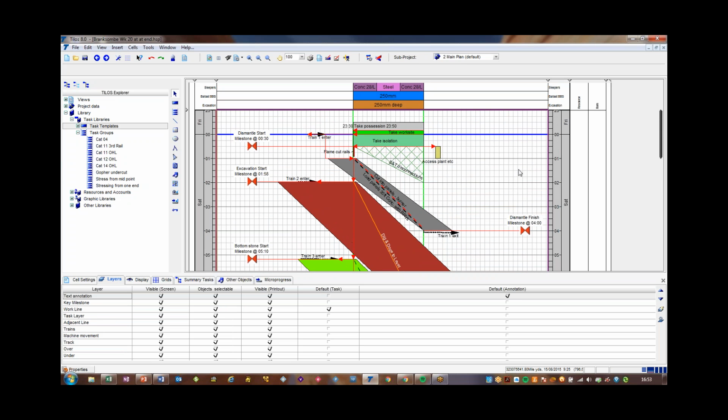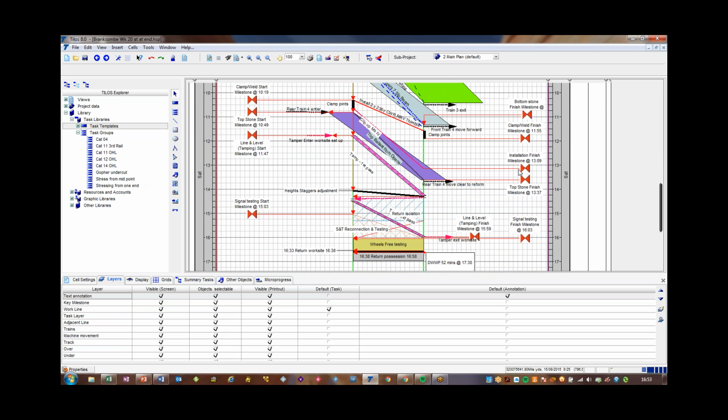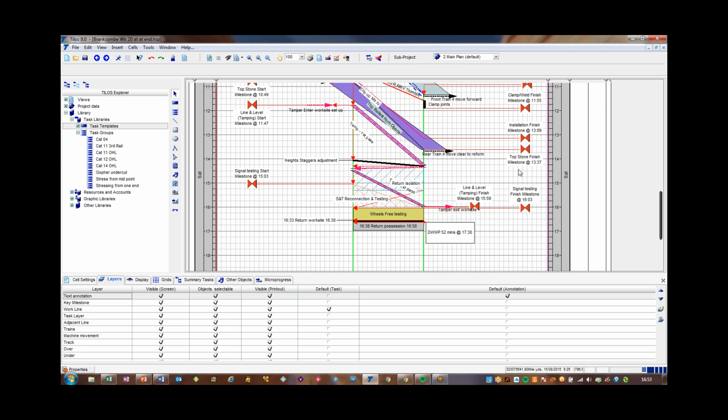That is it. So that's what I try and train people to do. In 10 minutes, you can make a whole plan. But what it hinges on is creating these task templates in advance, embodying your standard processes and output rates. We need to have those prepared in advance, and then I need to modify the training course to incorporate your steps, not other people's steps.